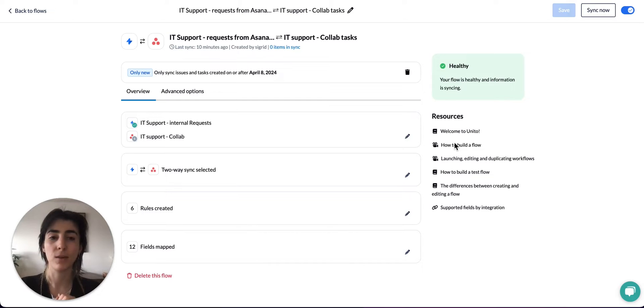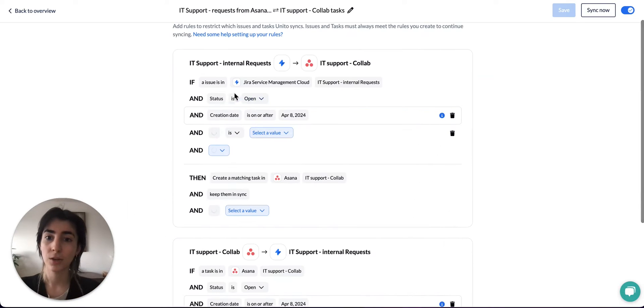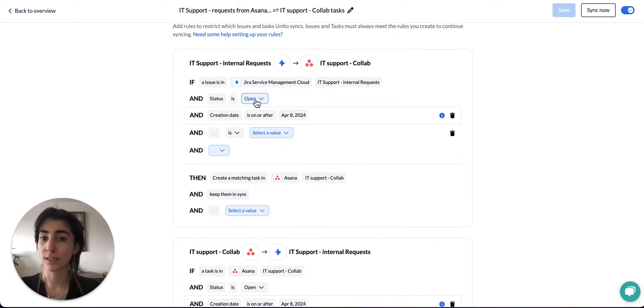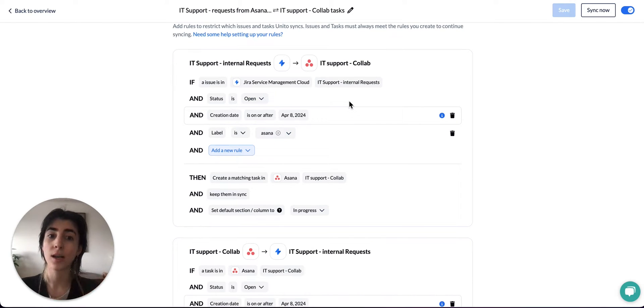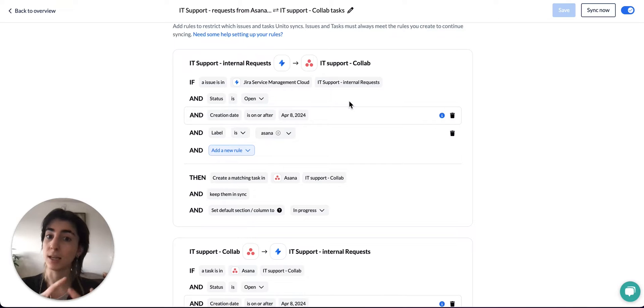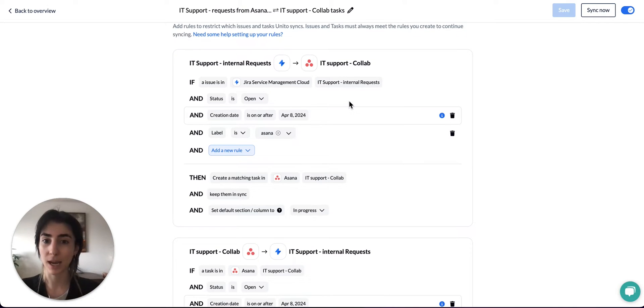So one of the main ways is to exclude items by using your rules. For example, you can create a rule so that status is open. This means that whenever you archive or close a card, it will no longer abide by the rules and it will therefore stop syncing. When the item stops syncing, it stops being counted.